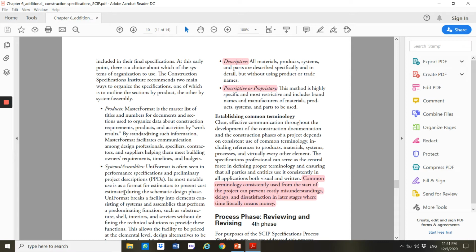What happened when the client representative came to check, he said take out all the Panasonic products. And he said, but that's how we normally do work, because in the contract document it will say Daikin or equivalent. But when he checked the contract document again, he realised in the specification there was no word equivalent. That is very risky.